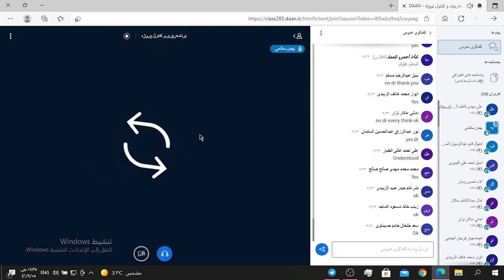And number 4, start to finish, SF. A logical relationship in which a successor activity cannot finish until a predecessor activity has started.